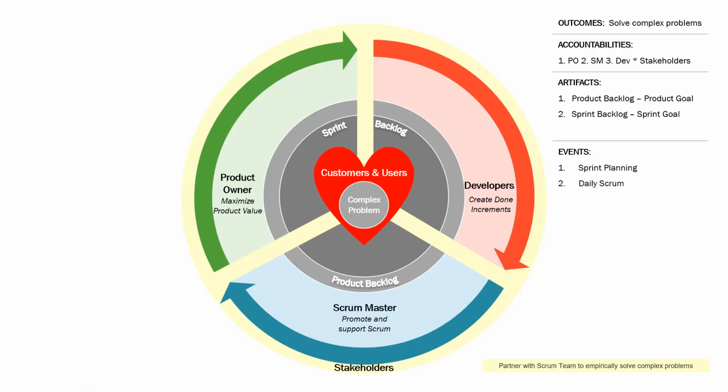Every day, the developers get together to reflect upon what they have achieved in the last business day and what might they achieve until the next daily Scrum. Along the way, they may choose to participate in an optional activity called backlog refinement, which tries to get slices of the product backlog ready for future sprint planning events.